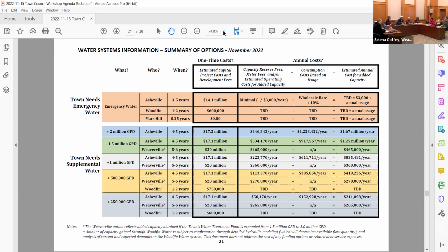So it could be that tonight we just say, let's proceed with making the agreement with Woodfin, with details like that to be decided at a later time once we do the hydraulic studies Woodfin requires. Yeah, get everything ready, but don't execute it. Don't pick the number, don't sign anything, because five or six weeks from now that could change. We may get some information. We don't know what we'll hear, and there may be other options that present themselves on expansion, or it could compress.